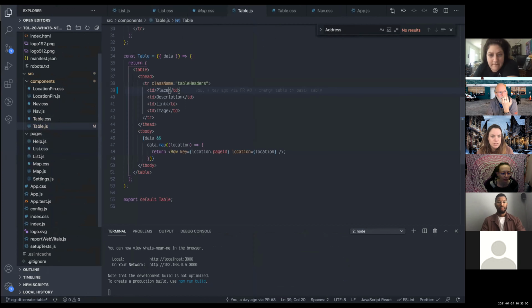So story splitting is actually taking a big story and breaking it down into multiple smaller stories that achieve the same end result. As an example, as a user, I want to be able to manage my account on xyz.com. Well, that actually implies a lot of different things, right? Managing my account includes logging in, resetting your password, maybe uploading an avatar, maybe viewing past transactions. Those are all things that go into managing an account.